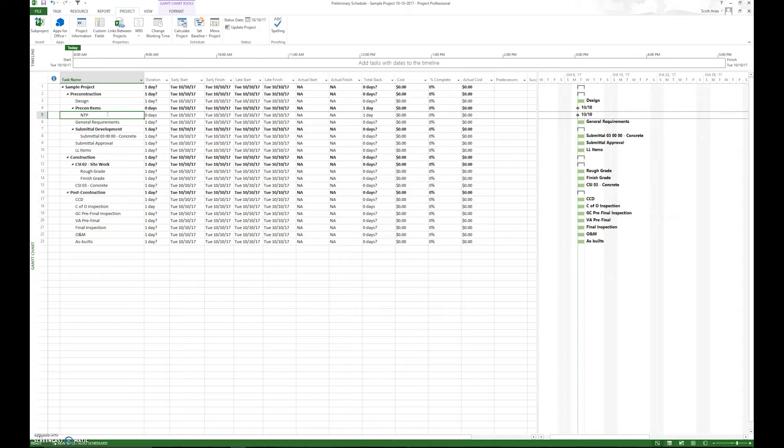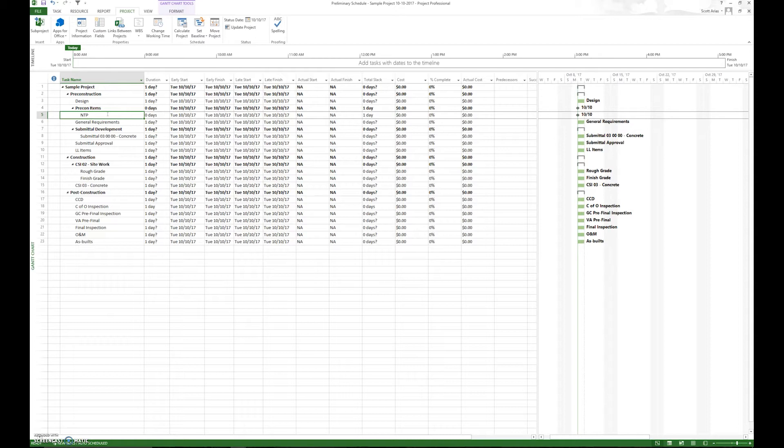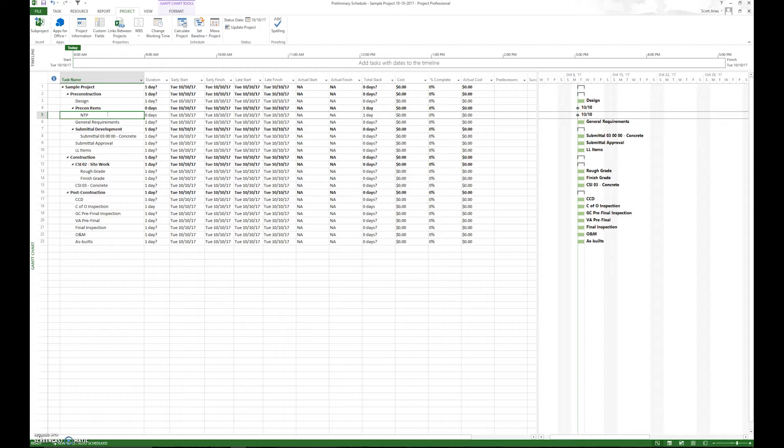So say if you have an activity that lasts 40 days, how do you break that 40-day activity up? Simply by identifying by scope, you could say erect concrete masonry wall, north side and west side. So worth 50% of it. And have another one, the south side and east side. So we need to figure out how we can break it down in order to get the scope work to fit in that two to 12-day model.